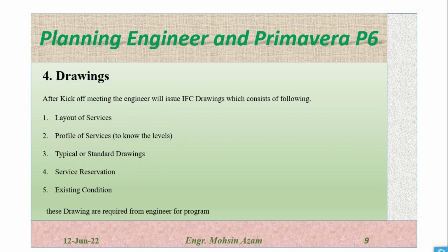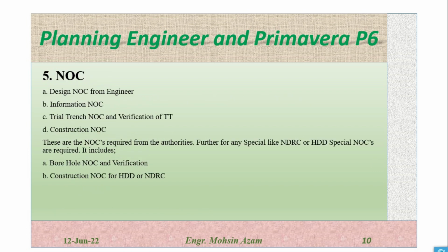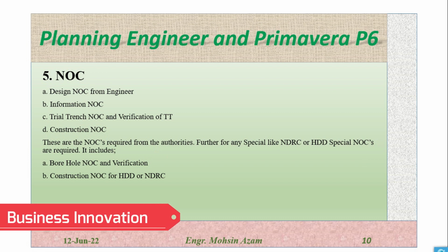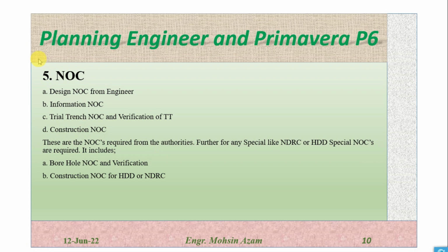After getting all these drawings, we will prepare the shop drawings, and then we will submit the trial trench verification with the shop drawing for the construction NOC. After getting the approval of the construction NOC, the contractor can start the work on the site. These are the NOCs required from the authorities.